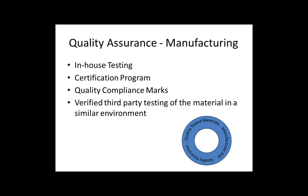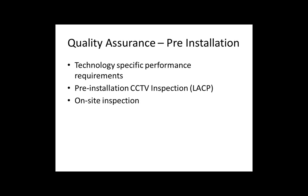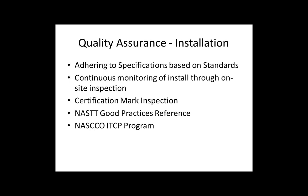During the pre-installation phase, it should be ensured that the technology specified meets the project's requirements. Pre-installation CCTV inspections should be a must. The LACP course — the Lateral Assessment and Certification Program by NASCO — has a lot of information on pre-installation CCTV inspections. On-site inspection during these pre-installation surveys is necessary. During the installation itself, it needs to be ensured that the specifications — originally based on the mentioned standards — are being adhered to, with continuous monitoring of installs through on-site inspection. Various organizations such as NASTT and NASCO provide programs and reference manuals, such as the Good Practice Manual and NASCO's ITCP program.